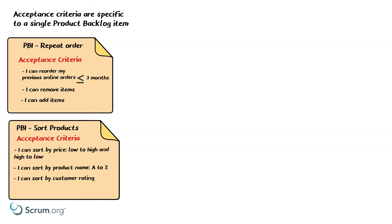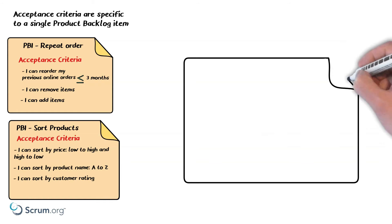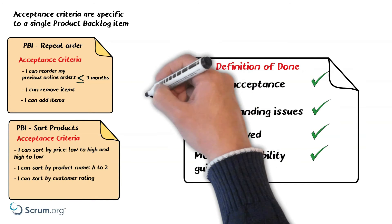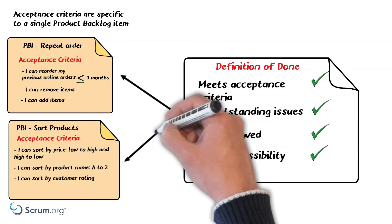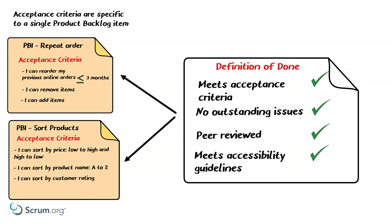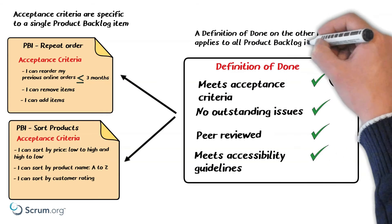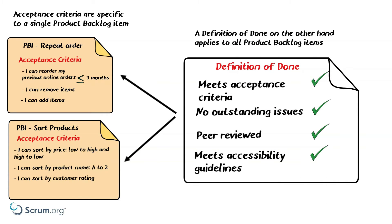Robin then brings up an example of a definition of done and asks the same question: could the criteria of the definition of done apply to both product backlog items? The answer is yes. A definition of done applies to all product backlog items — it ensures a quality standard for the work the scrum team does.